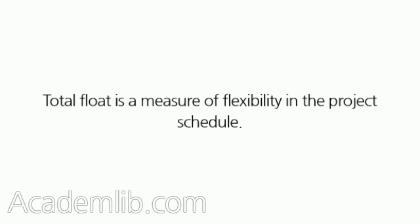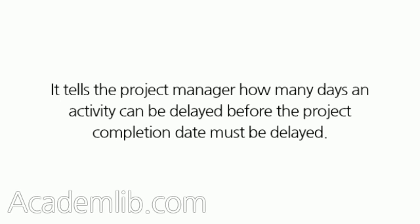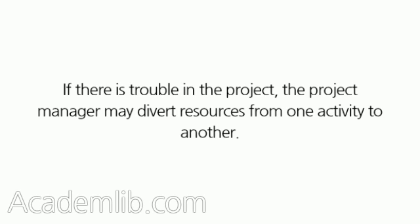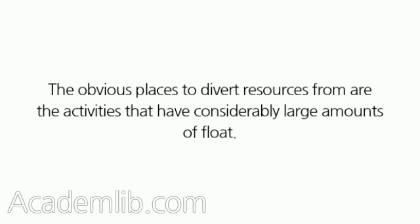Total float is a measure of flexibility in the project schedule. It tells the project manager how many days an activity can be delayed before the project completion date must be delayed. This is valuable information. If there is trouble in the project, the project manager may divert resources from one activity to another. The obvious places to divert resources from are the activities that have considerably large amounts of float.